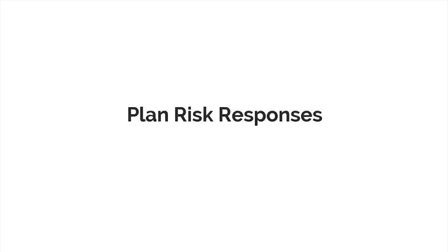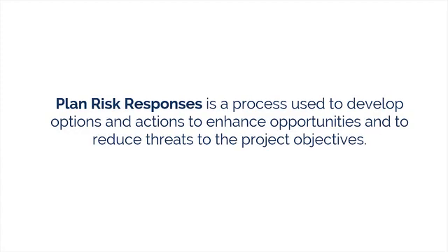The fifth process in risk management is plan risk responses. This is when we develop options and actions to enhance opportunities and to reduce threats to the project objectives. Risk responses should be appropriate for the significance of the risk, cost-effective in meeting the challenge, realistic within the project context, agreed upon by all the parties involved, and owned by a responsible person.